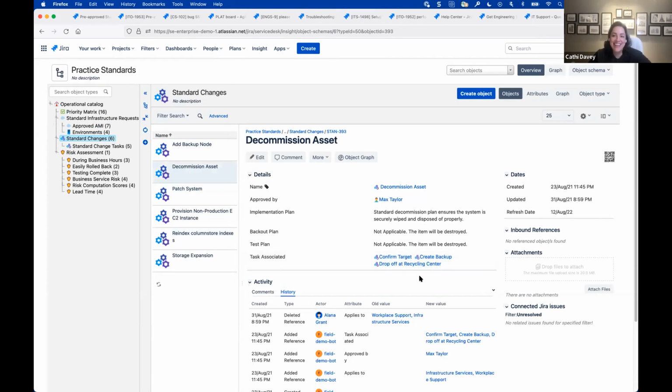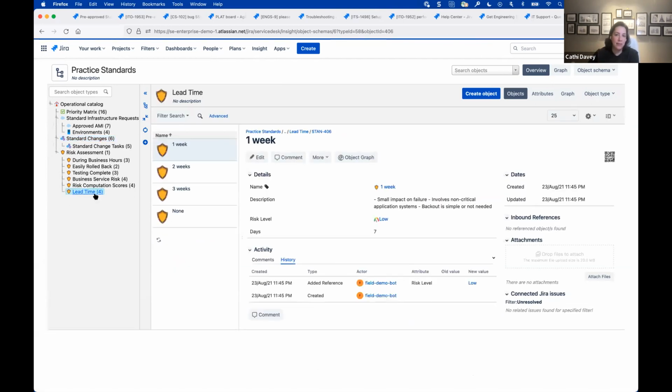There's some with different tasks. But the fact that you can start to use this to drive what's happening, to drive those different pieces. The other part there, right? So it was not only filling in this information, creating those tasks, but I also had lead time. Lead time was based on the priority, and so it actually went and looked up the number of days, and then I had the automation calculate that and put up the warning. So using this to drive that information.